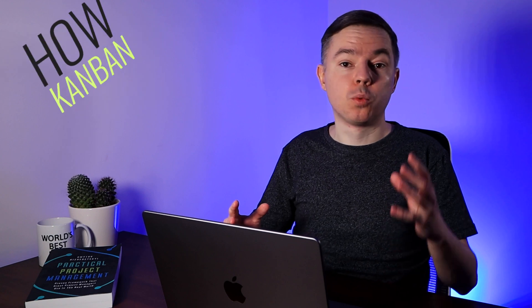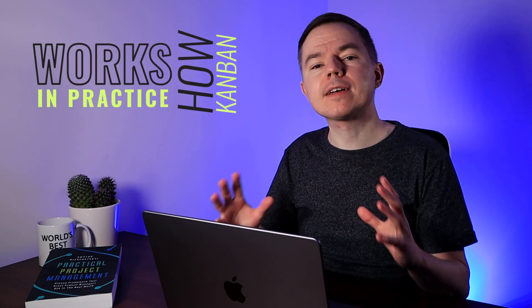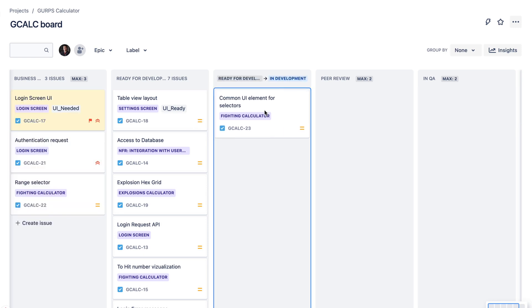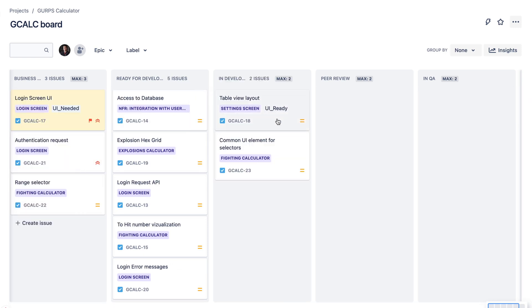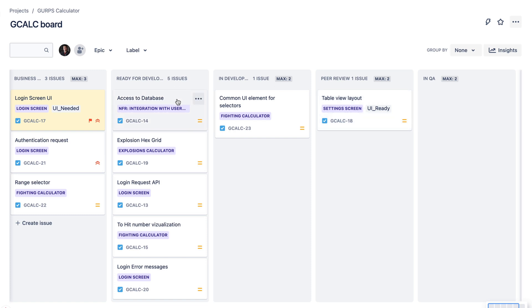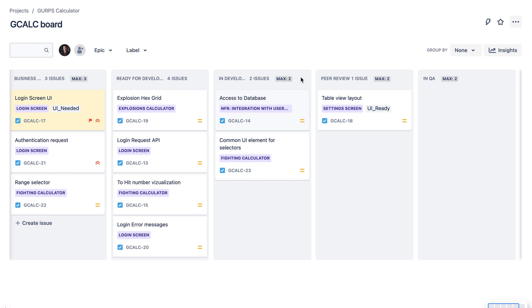Let me show you how Kanban and work-in-progress limits work in practice. For example, we have two software engineers and one quality assurance engineer. In this workflow, it makes sense to put work-in-progress limits to two in all columns. At the start of the project, developers take two tasks from the to-do and move them into the in-progress column. They write code, and when the first developer finishes his task, he pushes it to peer review and can start working on a new task. Each developer has no more than two tasks to focus on — it's still a context switch, but always limited to two things, making it easy to plan your day.